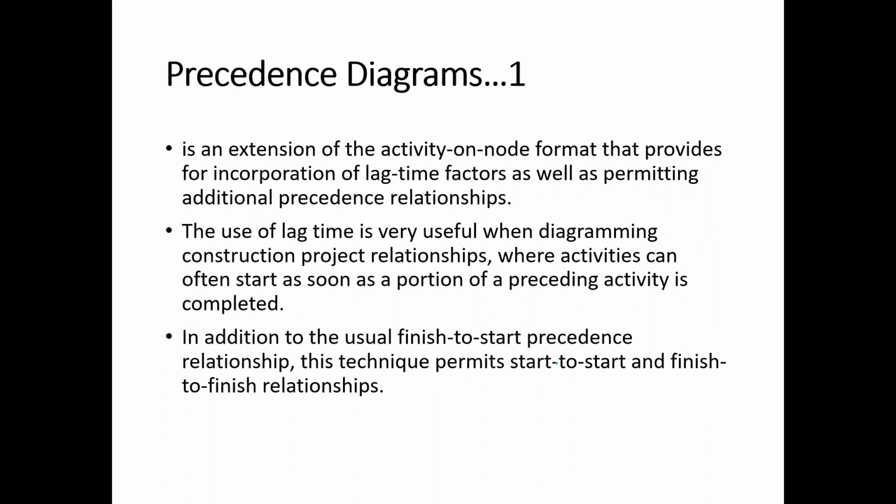Okay, so the lag times are also incorporated in the construction of a pipeline or in the laying of the pipeline. Once you start digging for the pipeline, you dig for like 100 meter or 100 feet long, and then that digging operation will continue for the next phase. And then you can put a lag of say 4 days between the laying of the pipe and the excavation of the pipe.